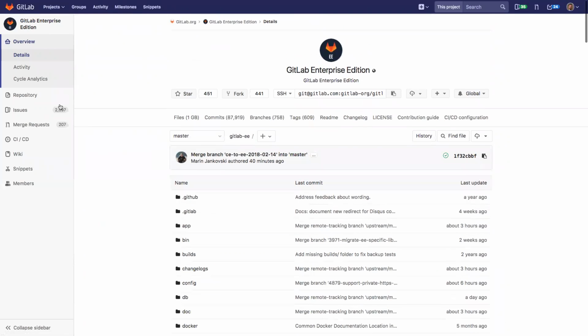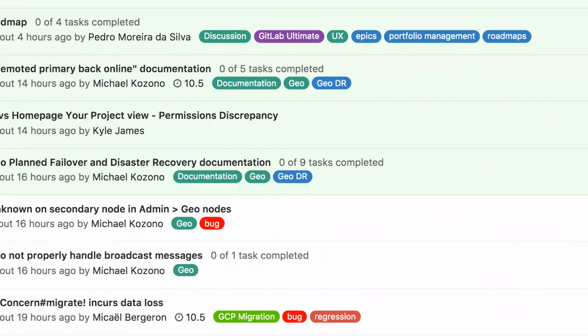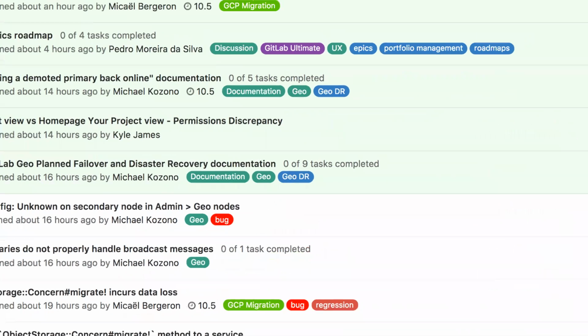The repo itself here is where we track our issues. So thinking about agile project management, and what I will call a lightweight type of agile project management, because we move really fast, this is our backlog of items. The labels that you see across any of these issues help us identify quickly whether these are at a specific stage in part of the delivery workflow, whether these are pertaining to a specific function in the application from a business side, etc. That allows you to be very specific about what we're tracking, how we're tracking it as well.